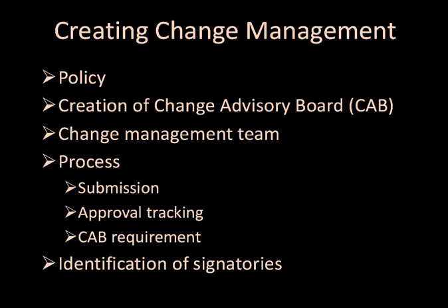In addition to the CAB, the day-to-day change management process must be assigned to a responsible manager. In my case, I was responsible as the Director of Information Security. My team received change requests and ensured the correct sign-offs were obtained. The change process, although often unique to how a business operates, should always include three phases: submission, change approvals, and a decision point at which the change management team decides whether the change should go before the CAB.